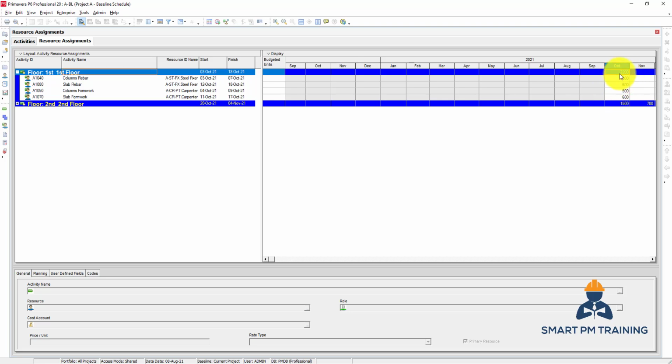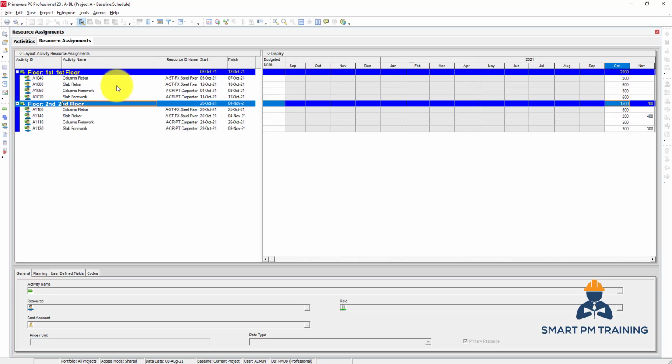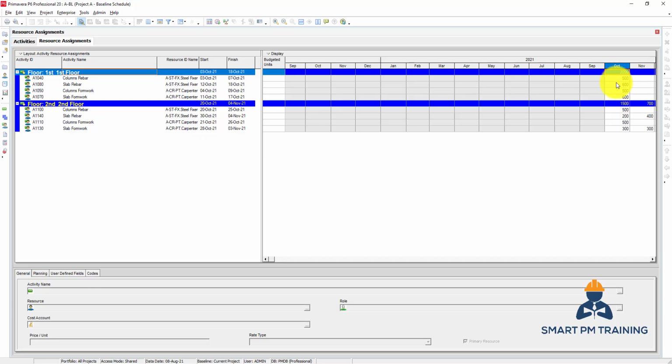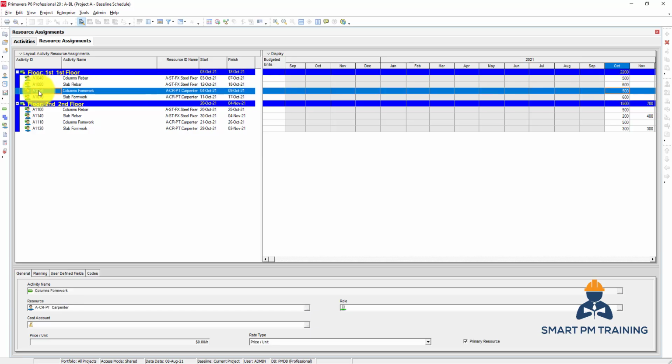So I have only labor hours here. Primavera can calculate the total for me on a high level. It makes sense that if you have equipment, for example, or ceramic tile materials assigned in square meters, of course Primavera will not sum all of that for you, because you are not comparing apples to apples. So make sure that you filter properly. But this is also another advantage of activity codes. You can use it anywhere in the program for grouping, presentation, filters. So this is all about activity codes. And in the next section, we will talk about how to maintain and assign baselines and do your update.